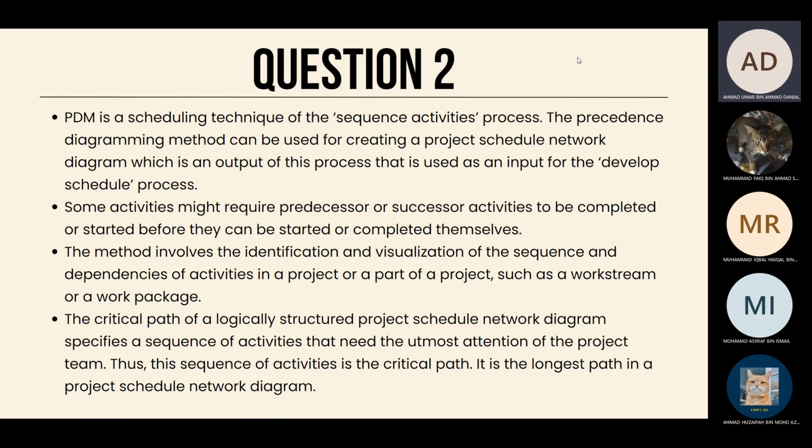Some activities might require predecessor or successor activities to be completed or started before they can be started or completed themselves. Next, the method involves the identification and visualization of the sequence and dependencies of activities in a project or a part of a project, such as a work stream or a work package.